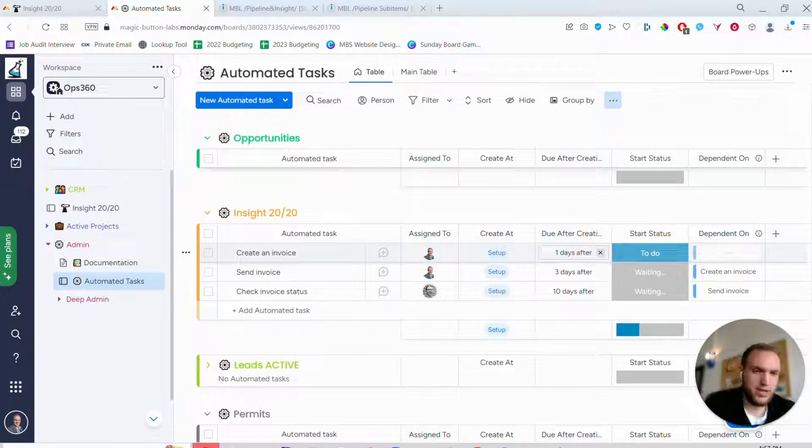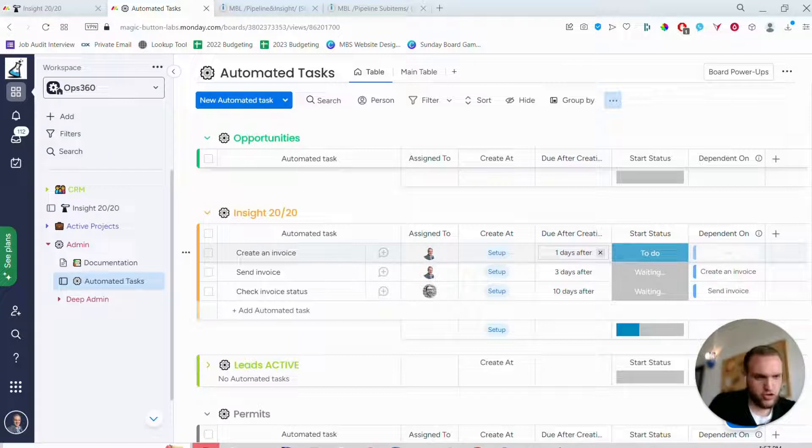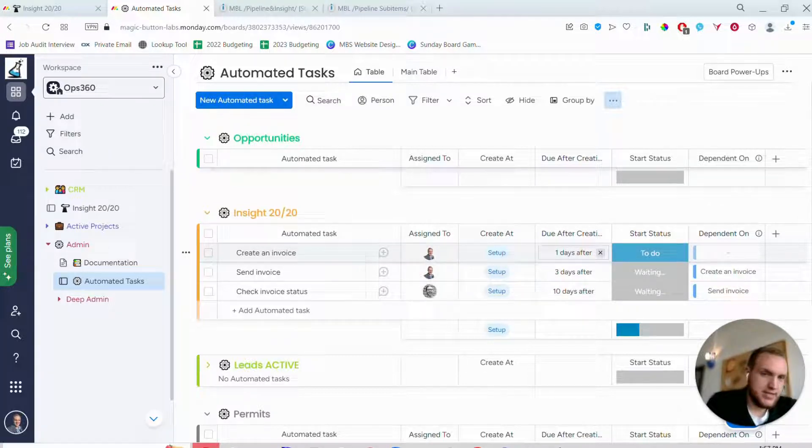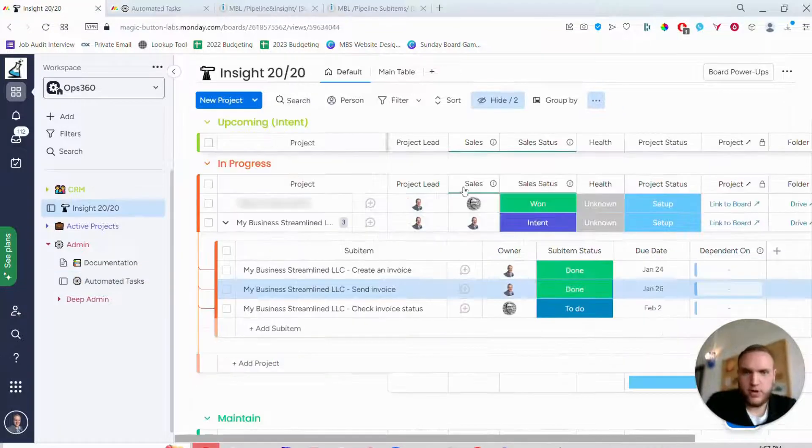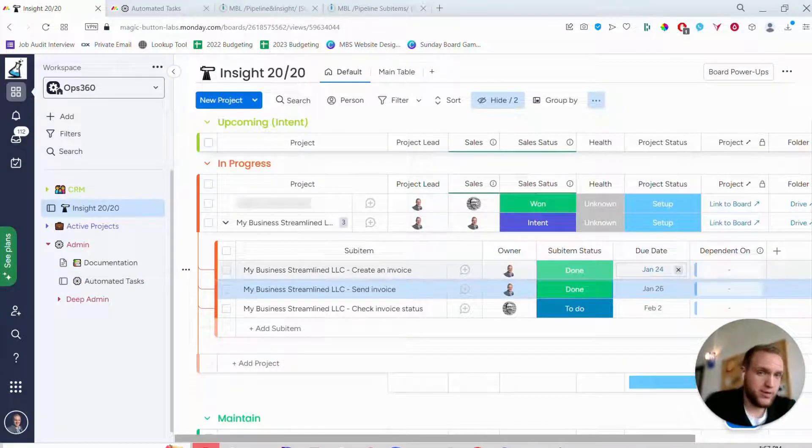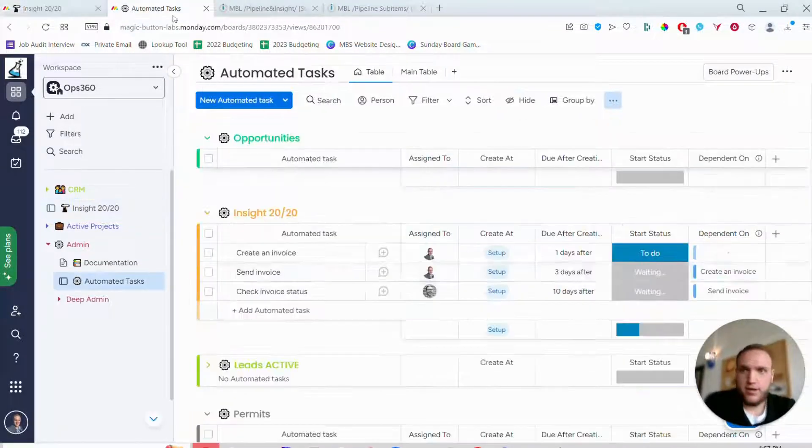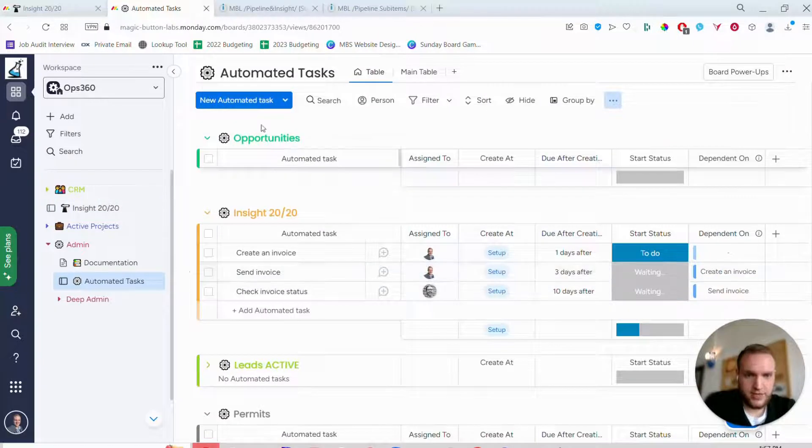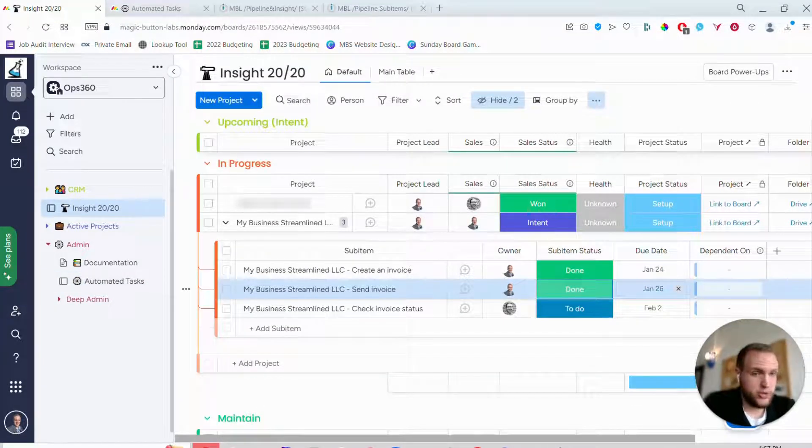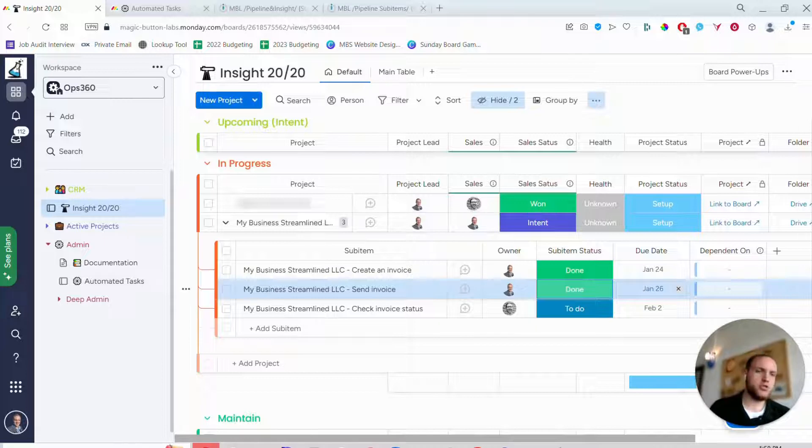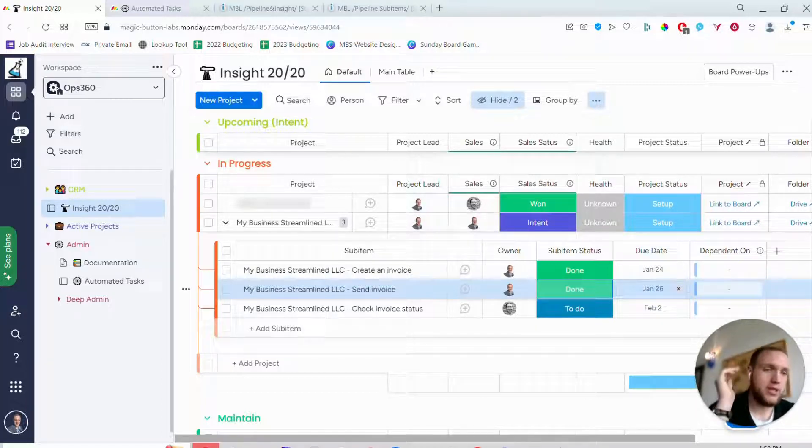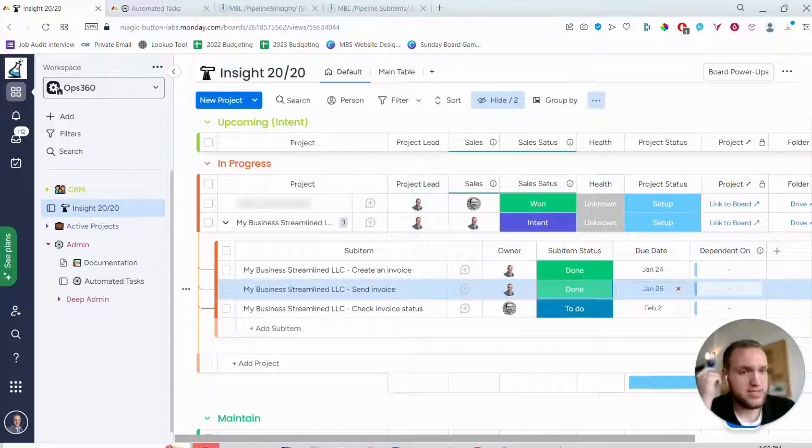Meaning when the trigger happens, when the status changes to setup, create a task and set the due date to be one day after. So if we go back over here, one day after today is January 24th. The other one I have is three days after, so three days after today is January 26th, and so on and so forth.